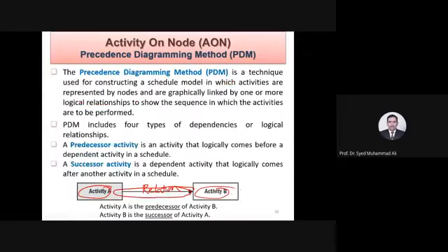B will not start unless and until activity A is finished. Unless activity A is 100%, you cannot start activity B.